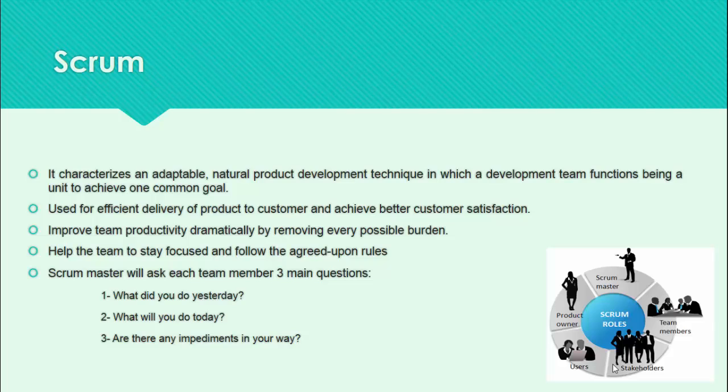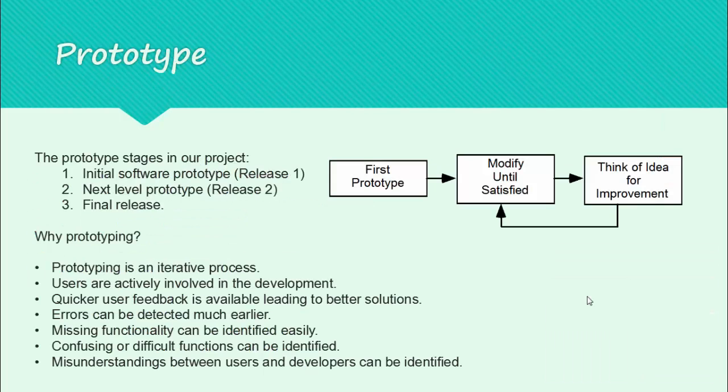One of them is the daily meeting, which is held by the Scrum Master. The Scrum Master will ask each team member three main questions. What did you do yesterday? What will you do today? And are there any impediments in your way?